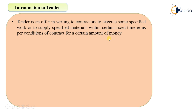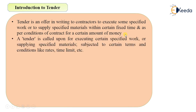There will be time mentioned in that tendering offer — the tender notice. The time will be fixed: you have to submit it before a certain date, the completion period of that particular project is fixed, and as per the conditions of contract there will be some conditions that a contractor has to follow, for a certain amount of money. Tender is obviously for the money — for some percentage benefit in the amount. You can also define a tender as: it is called upon for executing certain specified work or supplying specified material, subjected to certain terms and conditions like rates, time limit, etc.